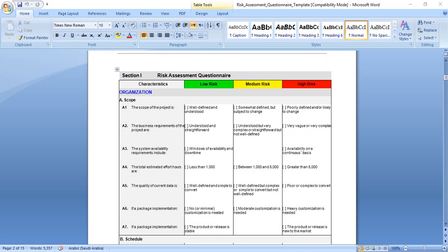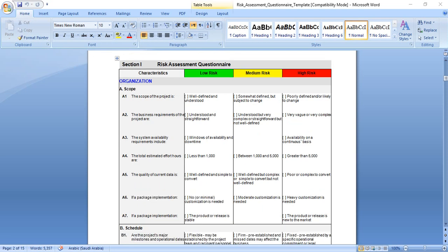To complete the questionnaire, for each characteristic, choose a phrase that best describes your project at time of assessment. Be certain to also complete the project planning risk assessment checklist.